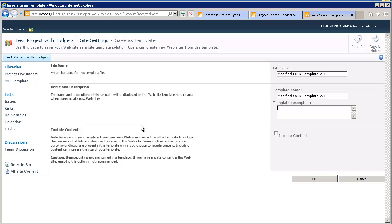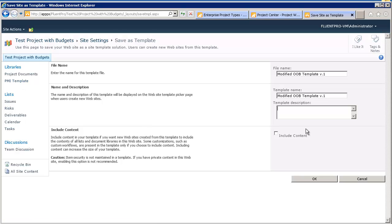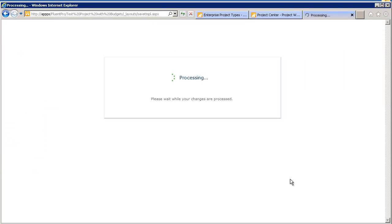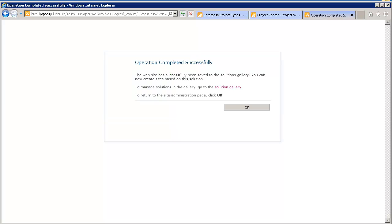Every time, the content of the documents and the lists will be saved into the template. So, when the new project is created, the PMI template library will already have a number of documents over there. Right now, we will not check that. So, we will just click on the OK button. And the system will start creating, saving the site as template.